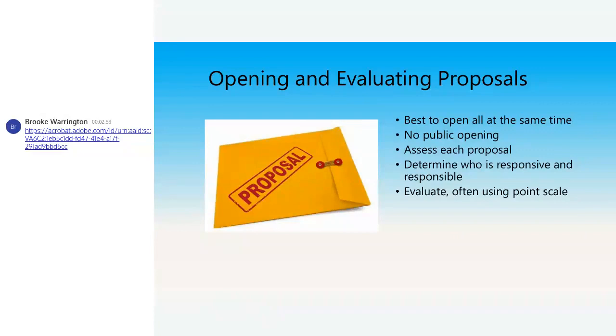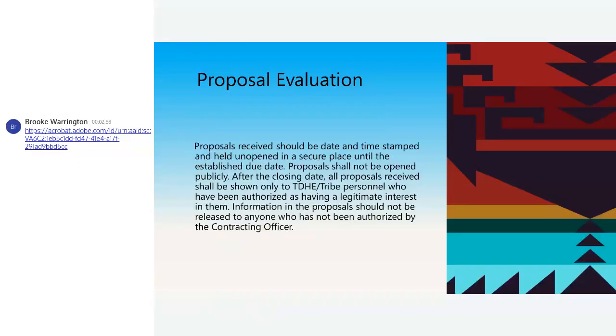So when you open and you evaluate those proposals, it's best to open them all at the same time. You are not required to do a public opening. You assess each proposal individually, determine who's responsible, who's responsive, and evaluate often using a point scale. And sorry, I'm running you guys a little bit late.